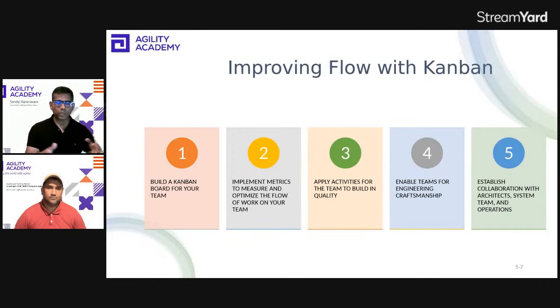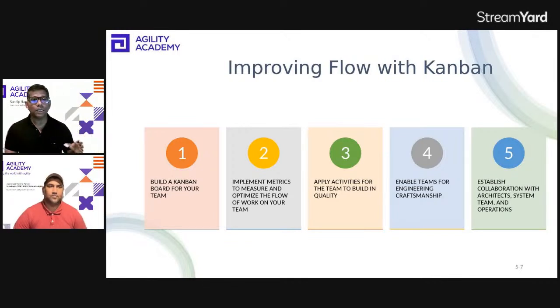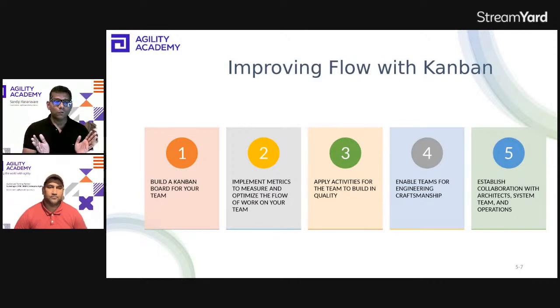So you start looking at different workflow steps, what needs to be done in order to measure progress. What metrics you need to look at? It might be lead time, cycle time, throughput, how to measure and then optimize your flow by referring to things like the cumulative flow diagram, flow velocity, flow load, and so on and so forth.